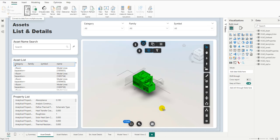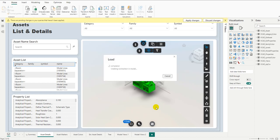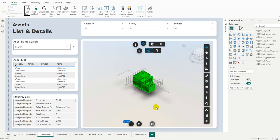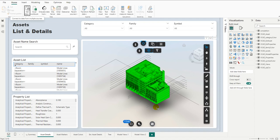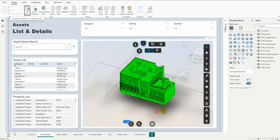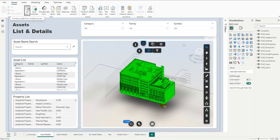Now, in this case, we are using a Revit model, so the external ID is the optimal solution. In other cases, we could have also used a specific custom property maybe that was defined in our BIM file. Just something that would allow us to identify the items in the report as well as in the model.